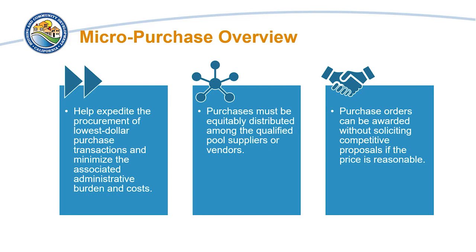Micropurchases help expedite the procurement of lowest-dollar small purchase transactions and minimize the associated administrative burden and cost by allowing for a pool of vendors to be preselected for future recurring purchases of predetermined items. Purchases must be equitably distributed among the qualified pool of suppliers or vendors, and contracts and purchase orders can be awarded without soliciting competitive proposals if the price is determined to be reasonable based on research, experience, purchase history, or other information that is documented. The determination of cost reasonableness for each micropurchase must be documented.